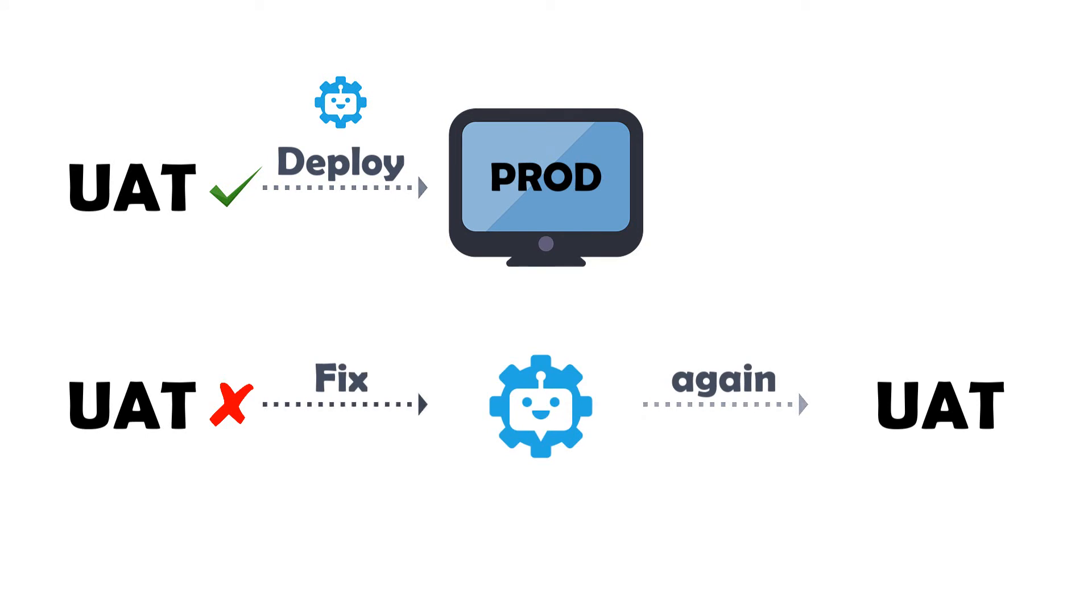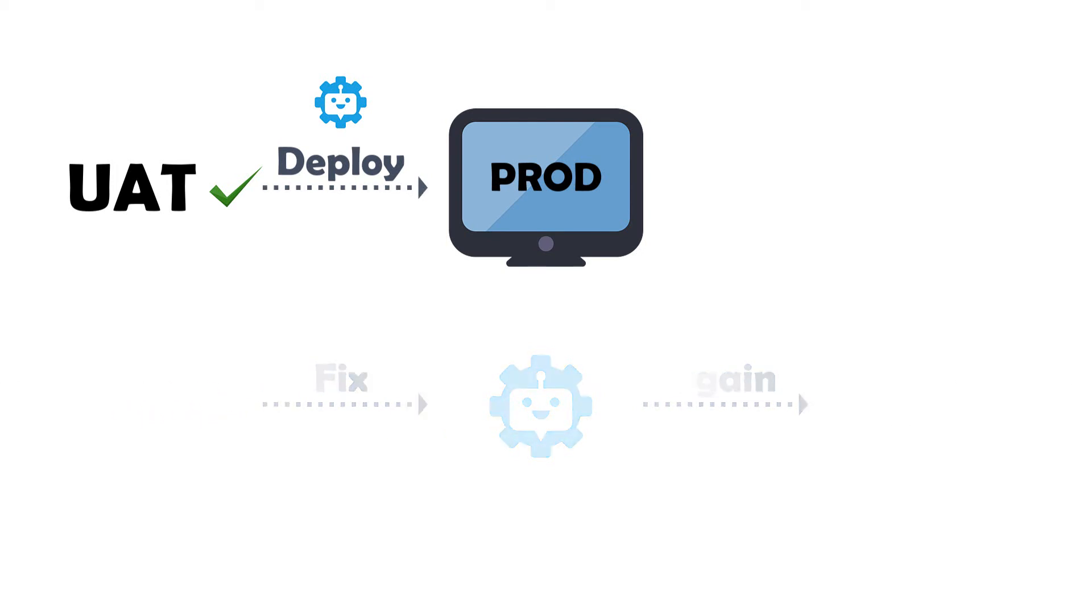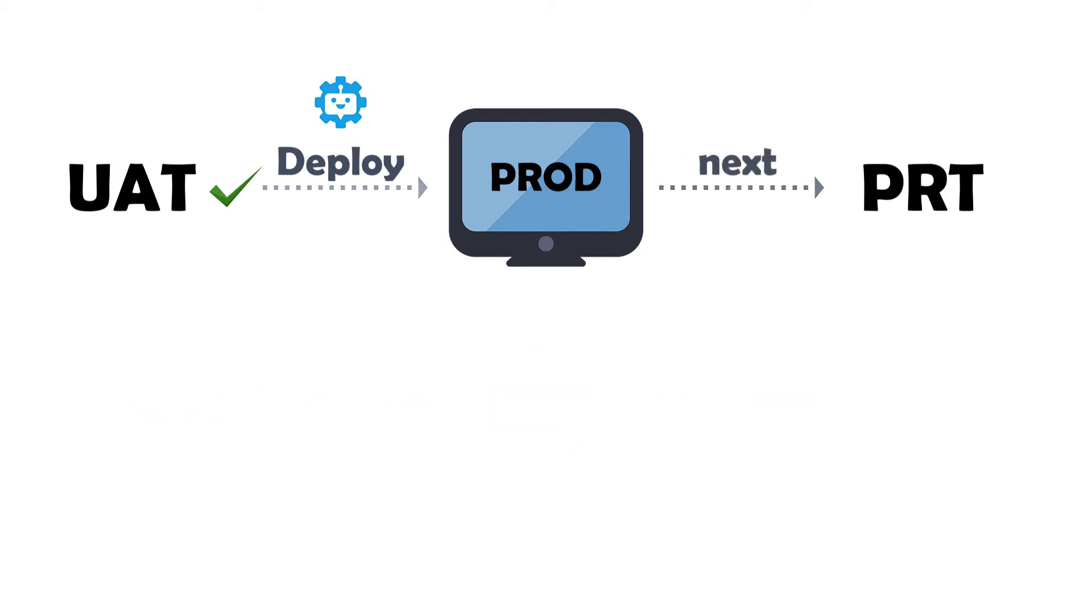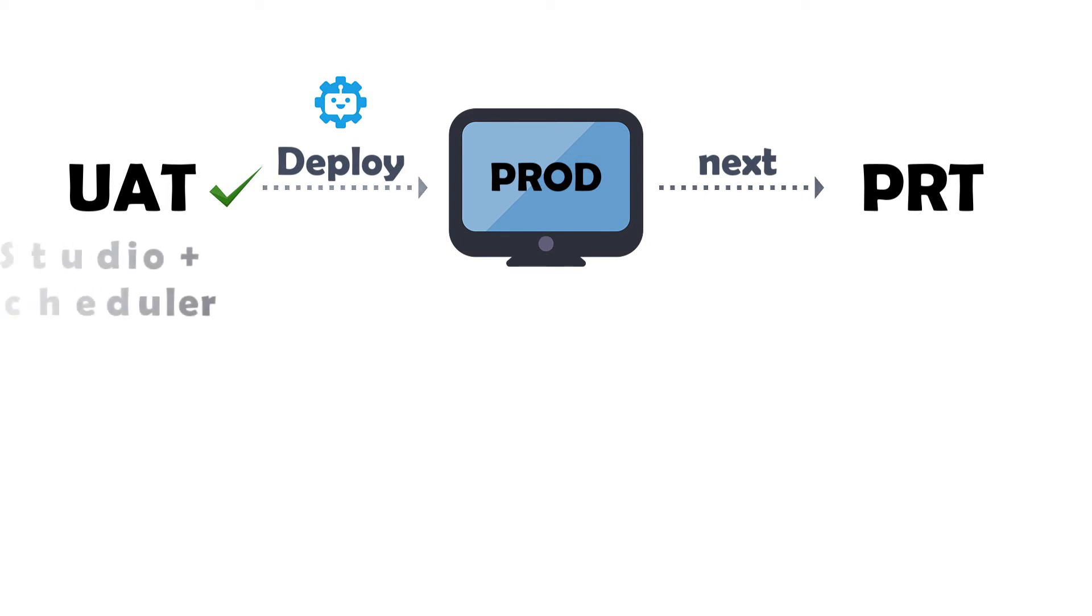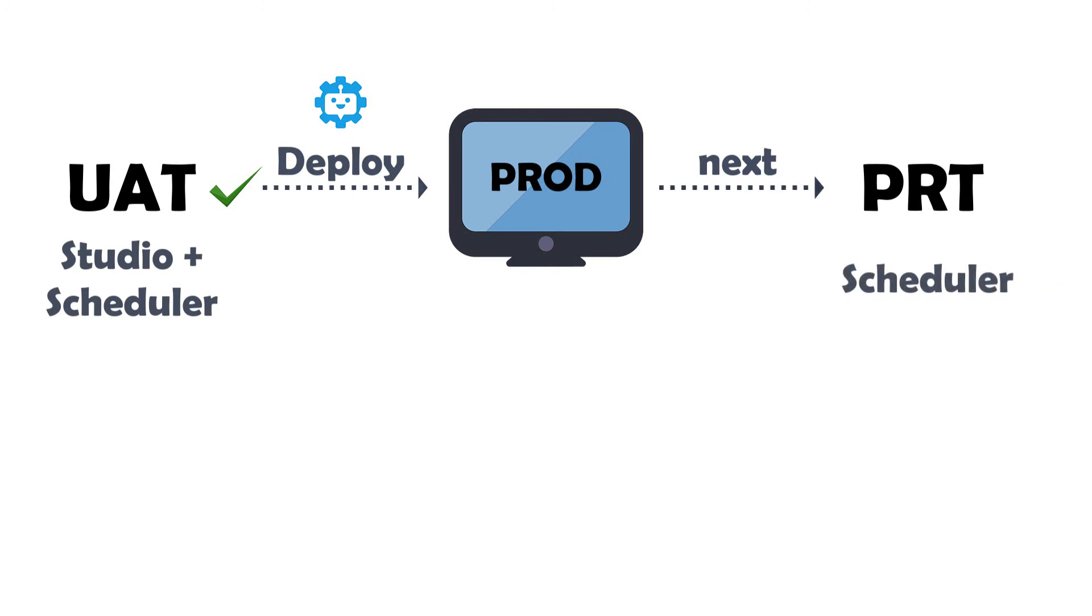We assume the UAT was successful and the bot is deployed on the productive machine. The PRT should now be carried out. PRT is exactly like UAT, but on the productive machine and with the productive system. The only difference here is that the PRT is not performed manually from the studio, but from the scheduler.